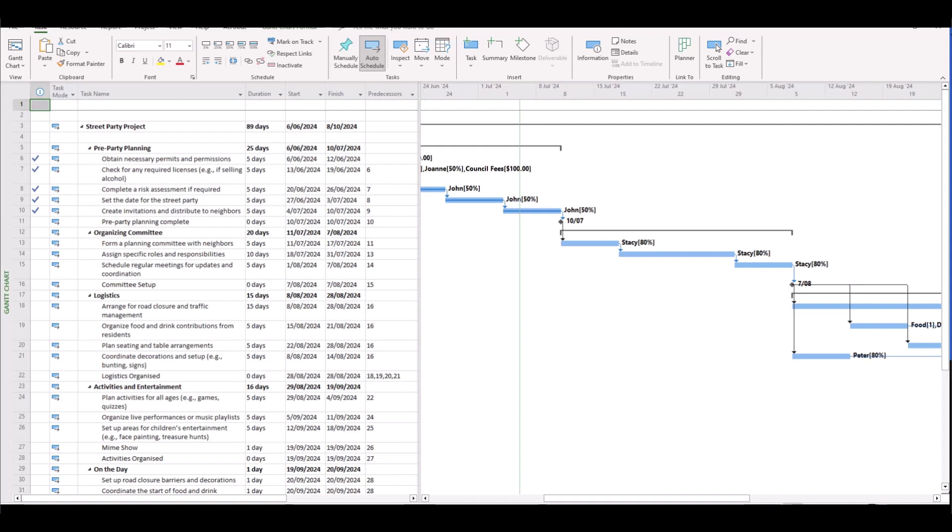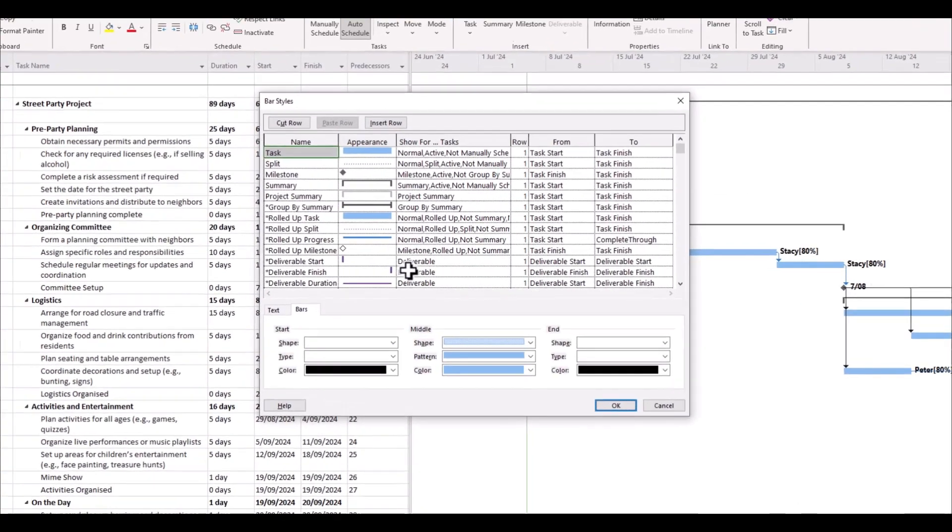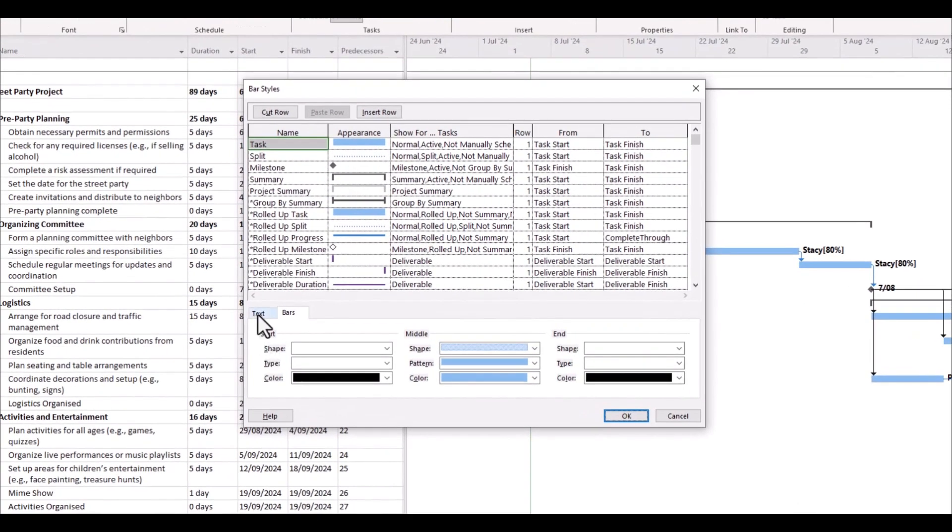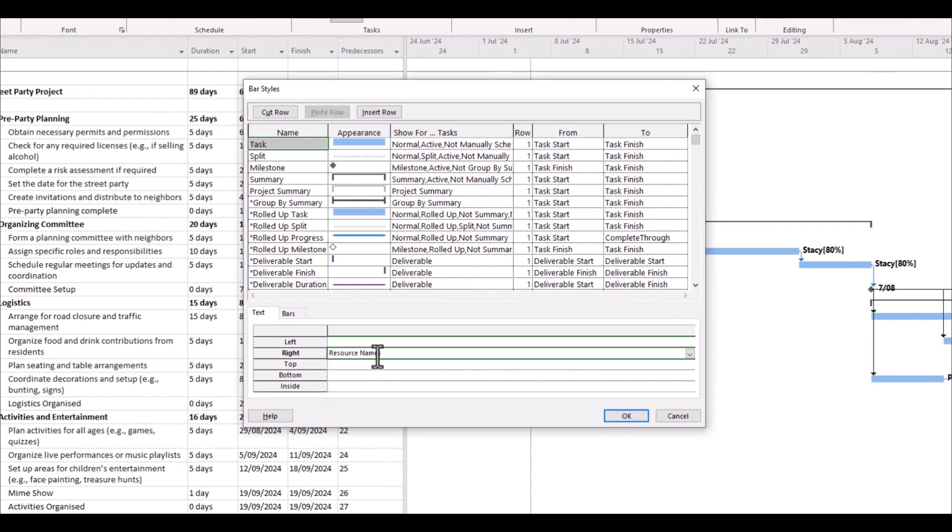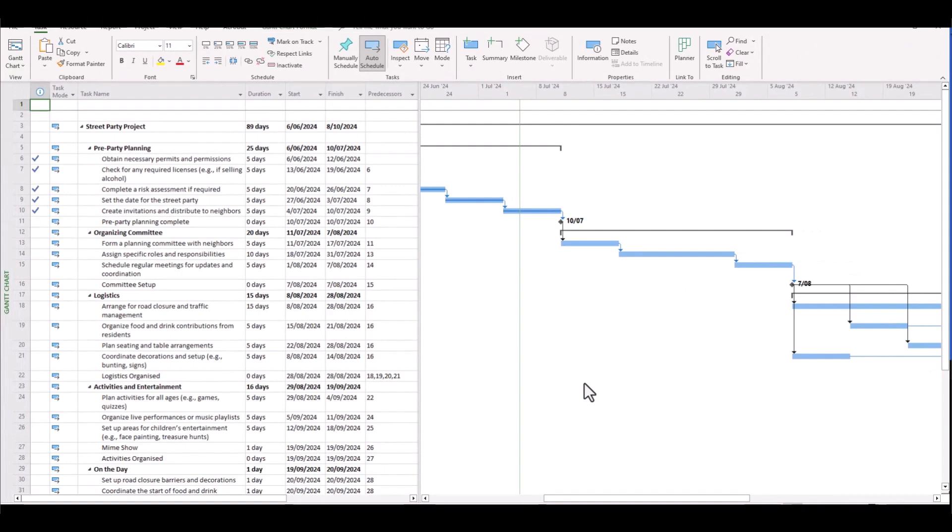Now you'll recall that in our displaying our schedule video, there's a simple and easy way to tidy up unwanted information on the Gantt chart. You simply right click on the Gantt chart itself and go bar styles. In this particular case, we're going to remove the text relating to resource names because some might find it a little frustrating. Particularly if you're going to print this, you don't want all sorts of unnecessary information distracting your audience from the key messages. Click OK and that piece of unwanted information is removed.